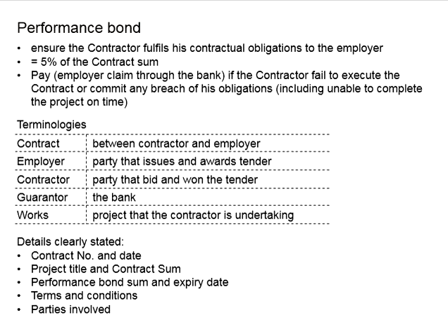It is regardless of whether the contractor would like to pay the employer, because now the performance bond is under the holding of the bank, which is the guarantor. When the employer is entitled to claim for the performance bond, the employer can claim directly from the bank. If with good justification, the bank should release the funds to cover the loss and expenses suffered by the employer. This prevents the problem of the contractor not wishing to pay the employer when he himself breached his obligations.